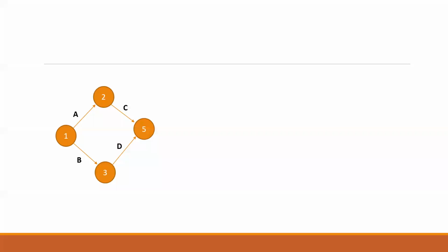E will come out of A again. So from 2 here, I can have another arrow E. And we do not have any merging here, so I can just put the circle here. So I have E here. Then F is going to come out of B. The preceding activity is B here.